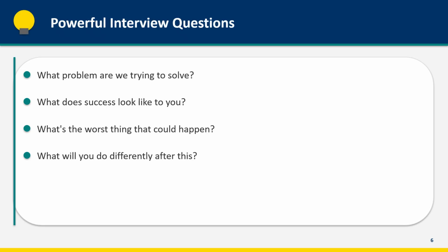Here are 4 powerful questions for requirement interviews. What problem are we trying to solve? This gets to the root cause, not the surface symptoms. What does success look like to you? This reveals individual expectations that might differ from official objectives.